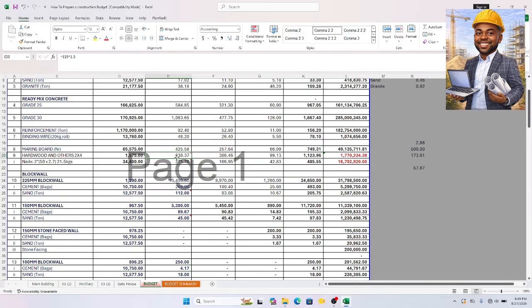Okay, so what we have here is this. For every one board, for every 2.88 square meter, I'll need about 1.5 length. So I already have them here, which is this. So just multiply by 1.5. I need 638 number for brazing here. For this quantity here, I times 1.5. So I have this total here. Multiply by the amount, I have this as the budget.